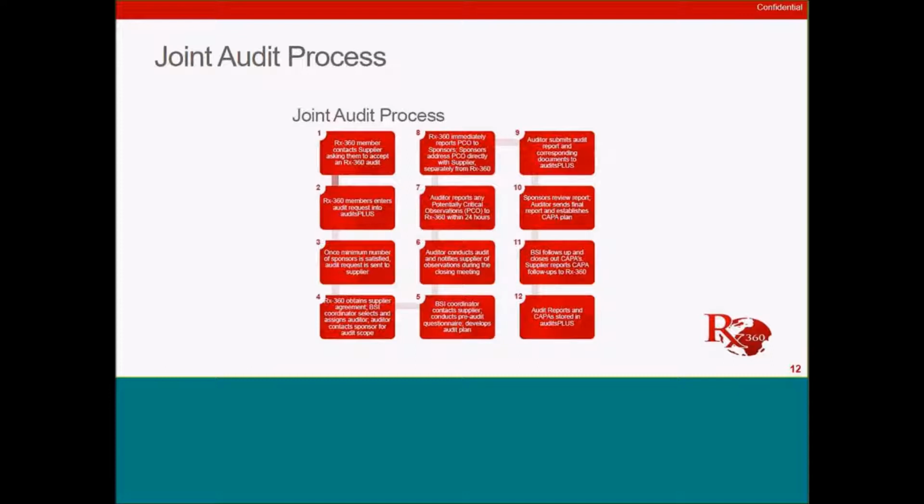Auditor submits audit reports and corresponding documents to AuditsPLUS. Sponsors review report. Auditor sends final report and establishes CAPA plan. BSI follows up and closes out CAPAs. Supplier reports CAPA follow-up to Rx-360. Audit reports and CAPA stored in AuditsPLUS.